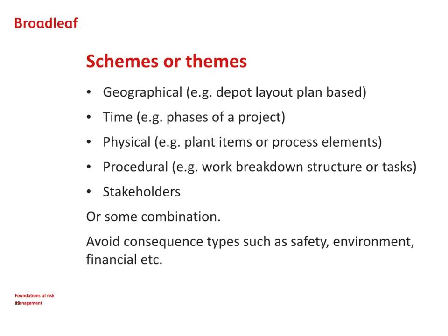Practically, we have to look at our external and internal factors and think how we can group them together. And there are various schemes that we can follow. For example, if the risk assessment is concerned with a physical activity or an area of our organisation, we could split it up into some sort of geographical basis.